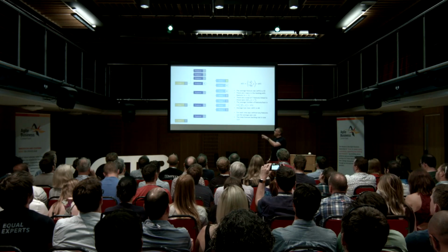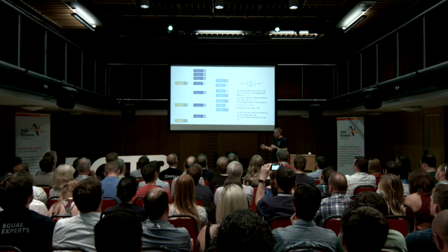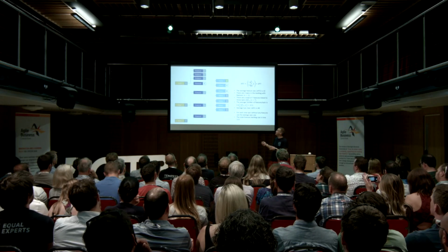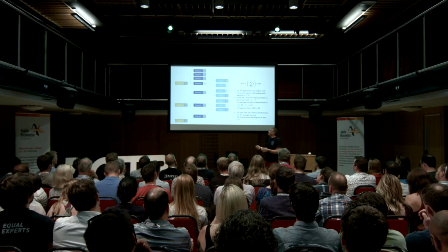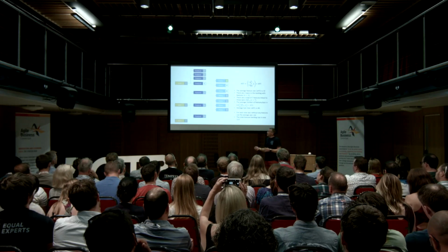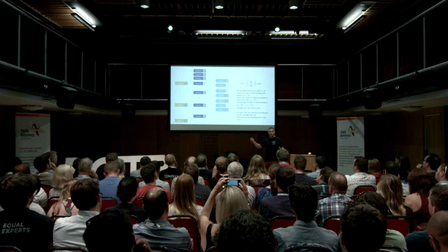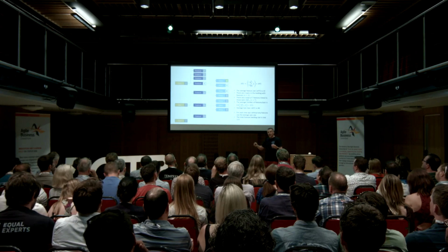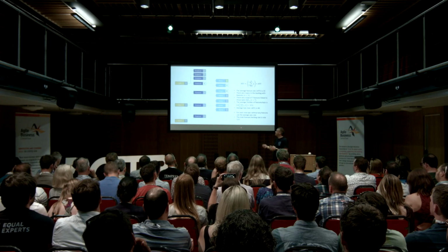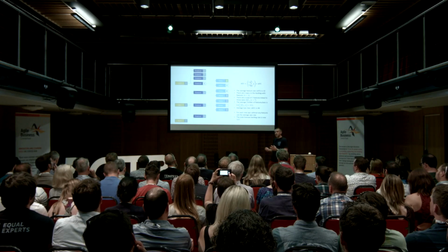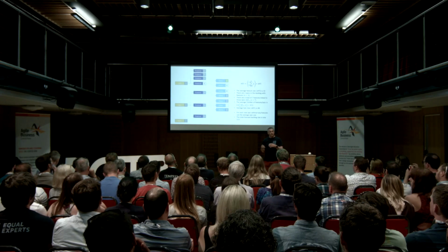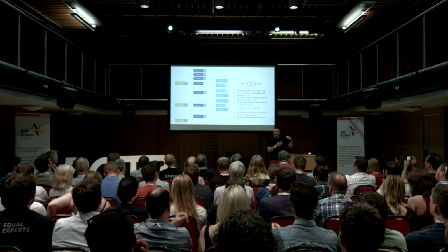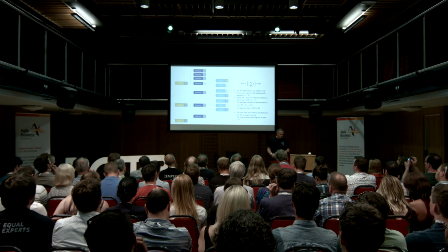So what we've done now is work on our backlog. We haven't really changed any of the estimates we've got in our backlog here, so we've still only got 18 points. But we've started to understand a little bit more about the total scope of work we're going to be delivering. And we started to make an estimate of how big that work is. So we can now see we've got 113 points in our backlog. We started with 18 points, and now we're forecasting that we've got to about 113 points.